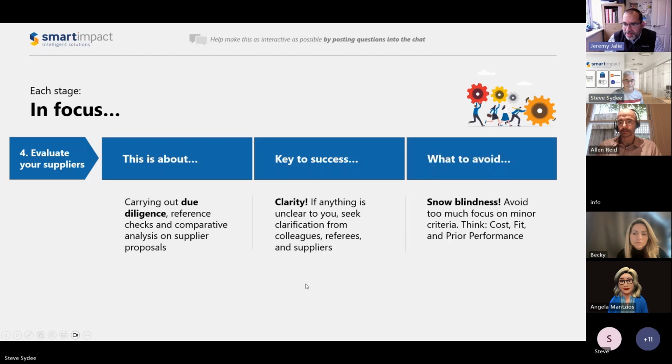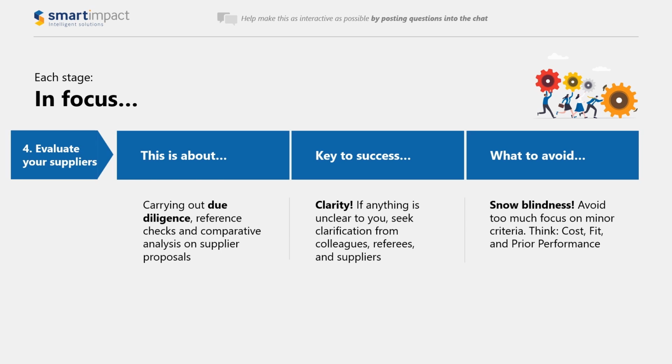So to an extent, I'm imagining that you've completed your RFP process, you've sent that out to organizations, and you've had responses back. So you're going through responses in detail. So this phase of the selection is all about reviewing the submissions and reviewing the discussions that you've had with suppliers up to that point. You need to obviously evaluate how closely they match your defined needs, and we do find that a scoring matrix of some sort that produces an objective way to compare is very, very wise and a sensible thing for people to put in place.